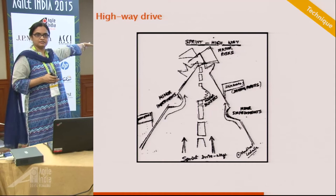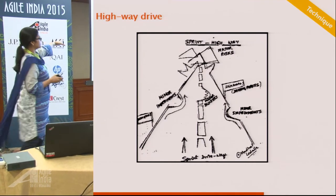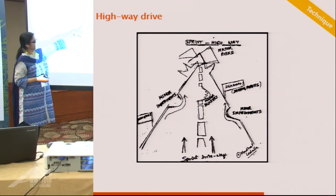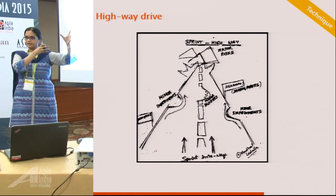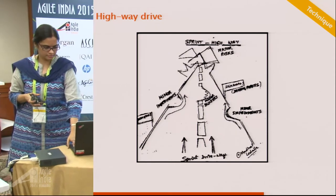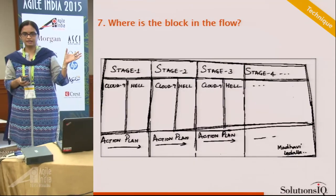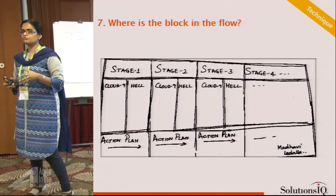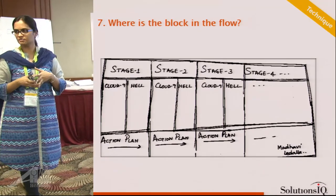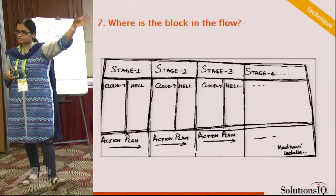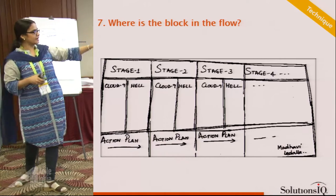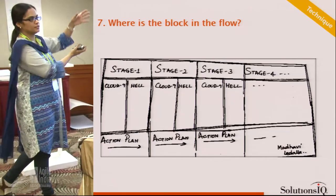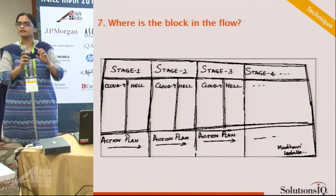The highway drive: the team is on a highway drive — sign posts help the team move ahead, potholes on the road are impediments, and dead ends represent risks. There's also a flow-blocker technique very useful for Kanban teams: when you have many problems and want to understand where the block is, draw the stages applicable to your team. Identify pain points in each stage — whichever stage has the most pain points is the problematic stage — very evident rather than doing a general retrospective.